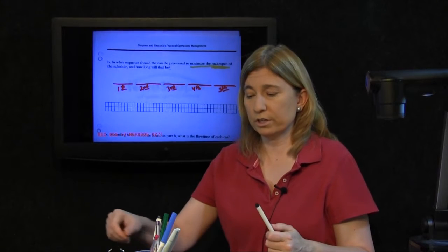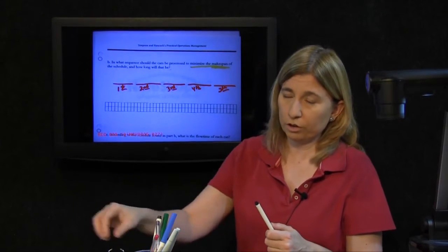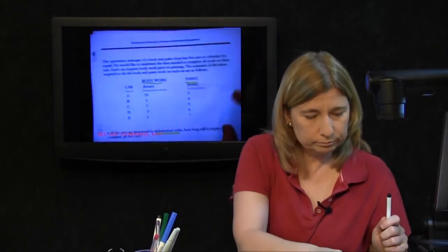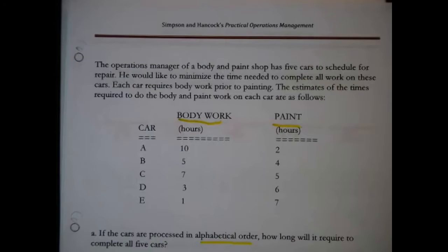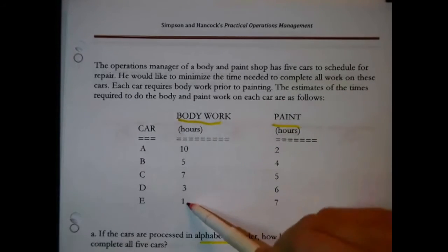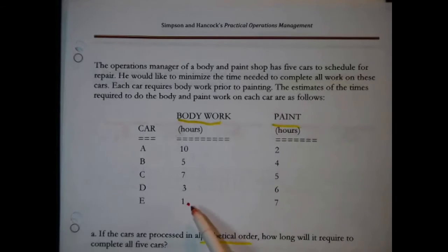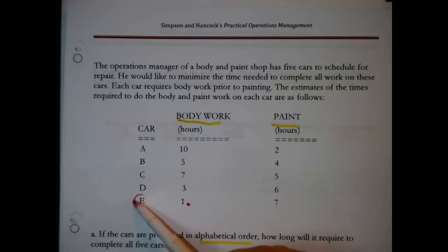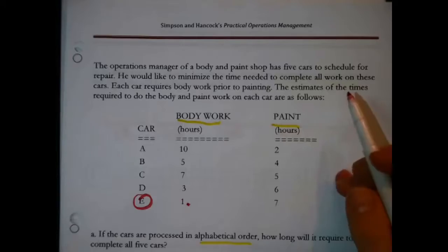Johnson's rule is basically the look for the smallest number rule. Go back to the original data. There it is. Look for the smallest number. Okay, with this data, there it is. It's that 1. If this number occurs at the first workstation, it does, right? The first column. Schedule that job first. Okay, done.